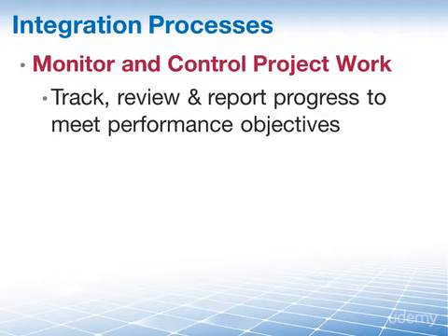But everything always changes, at least on my projects, so we want to have some kind of integrated change control. That's what this process here is all about. The process of reviewing all change requests, approving changes, and managing changes to deliverables, organizational process assets, project documents, and the project management plan, and communicating their disposition.